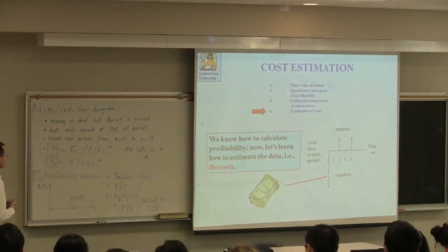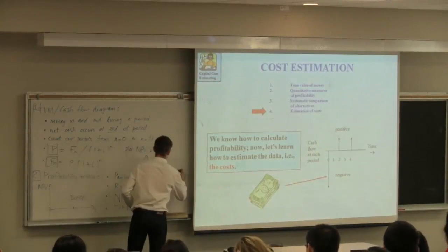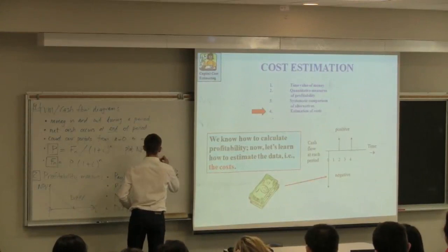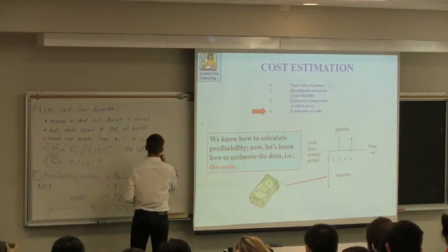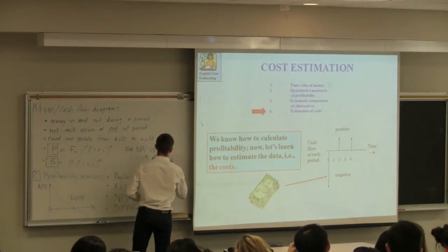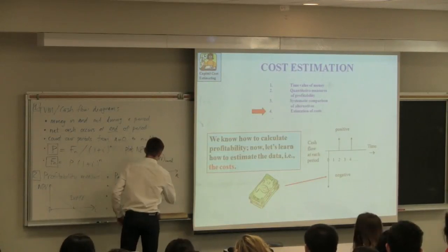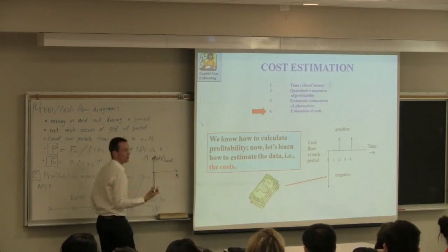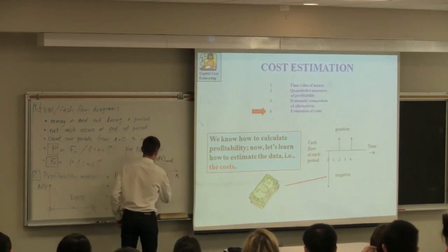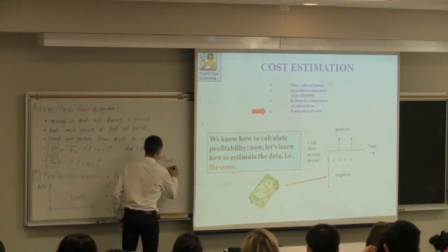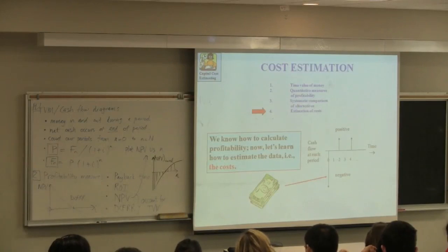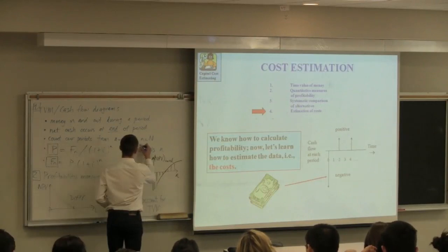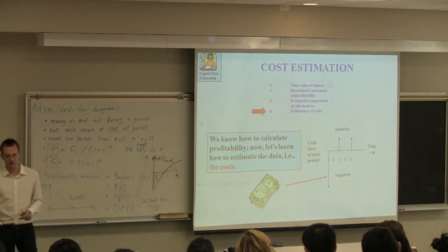Okay, so you make a plot with lowercase n, and we're plotting our NPV, our cumulative cash flow. So put NPV with the subscript cumulative. We're seeing a very large negative at the beginning, as in most engineering projects where we're spending a substantial amount of capital, and then our cumulative cash flow over time. That's a helpful plot to visualize. So it's emphasized that this is cumulative NPV versus the number of periods.